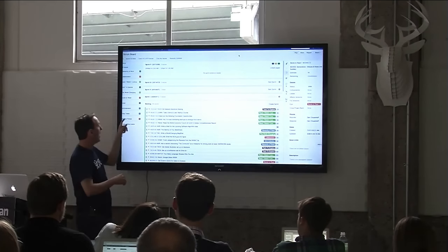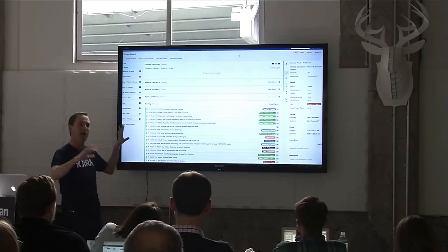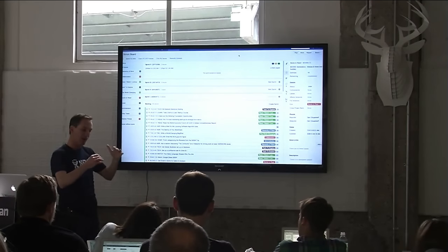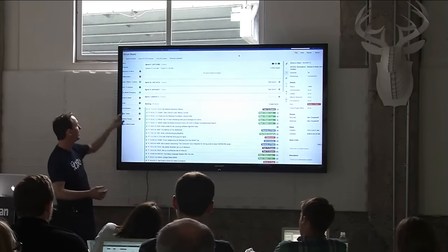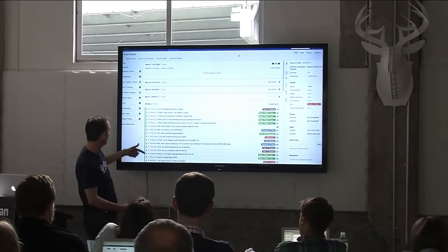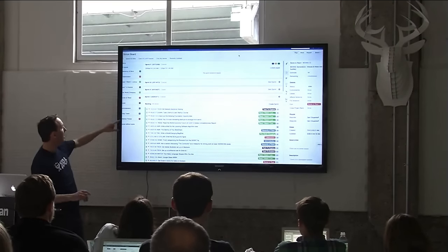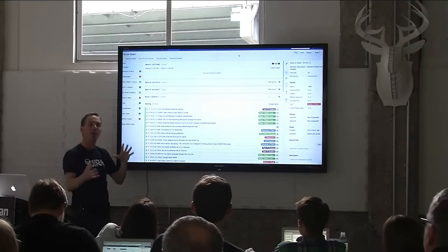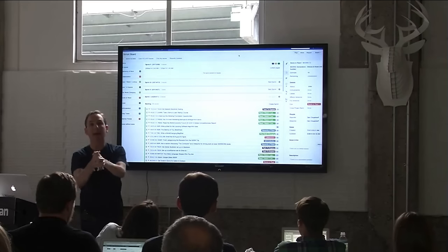An epic in Jira is more like a theme for that collection of work. The Agile team is working on making it more of a bucket that truly contains tasks, but right now it's more like a tag. In my own instance, I have an epic called 'books to read' — all of the books on my list have that epic. At any point in time I can click 'books to read' over here and it will hide everything except that, giving me a quick way to visualize all the work of a certain theme.